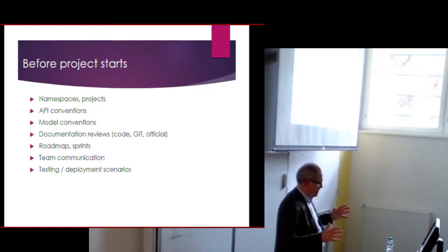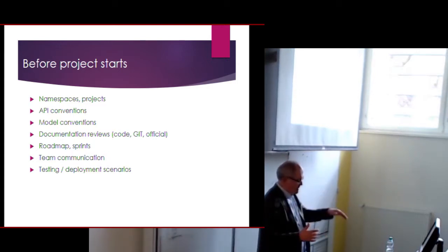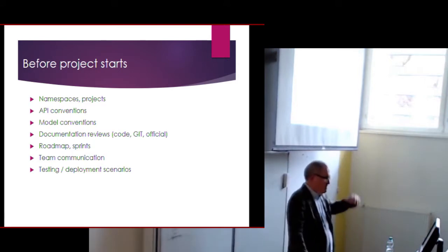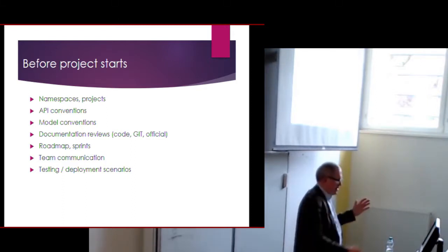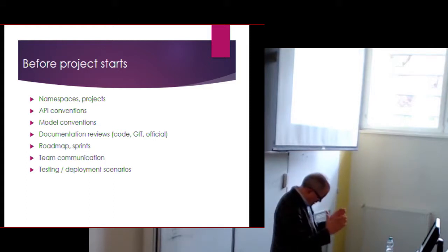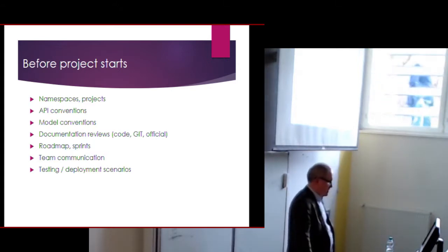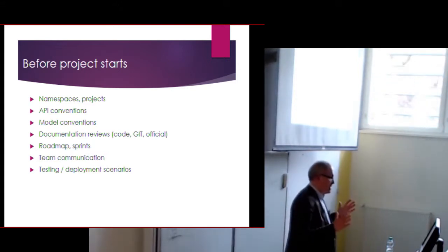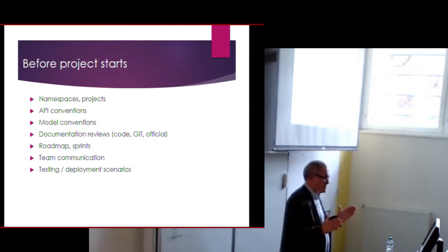We have to maintain roadmaps and sprints. If you have a large project as we have, you have a roadmap where you more or less know what we want to do within a year. And as we come to today, it is better and better described, down to these small chunks which are passed to the programmers. And this is organized by so-called sprints, which are mostly 2 or 3 weeks long.